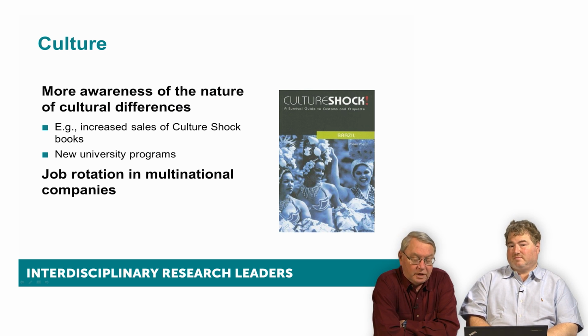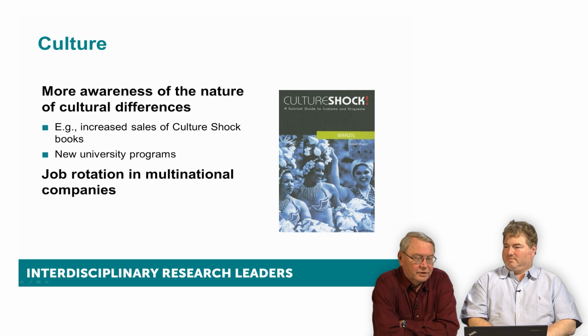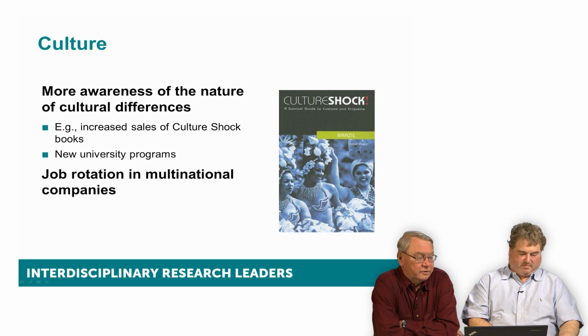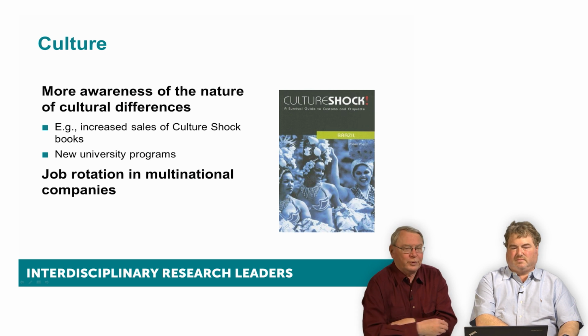I remember one concrete example was in the Ford Motor Company in France, they worked 35-hour weeks. They didn't work Friday afternoons. And yet, occasionally, the people in Dearborn would schedule a meeting that was on Friday afternoon in France. Well, people got very upset about that until they put a French person in Dearborn who could explain that you don't understand how our work week works.